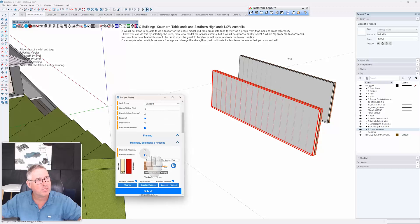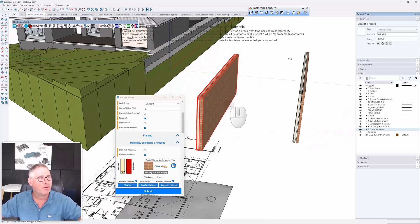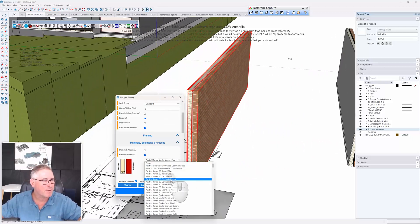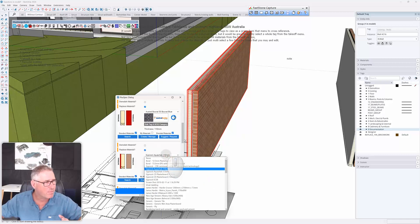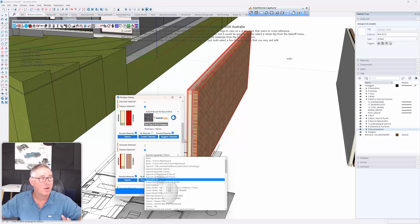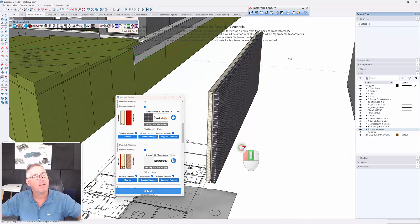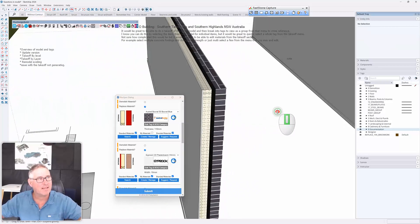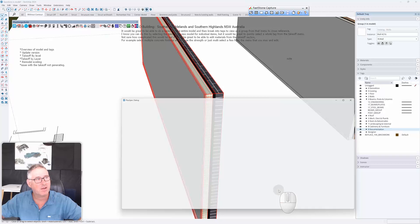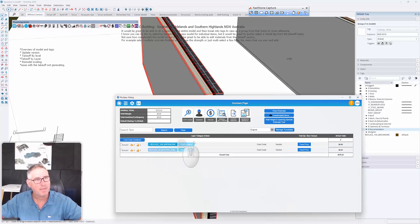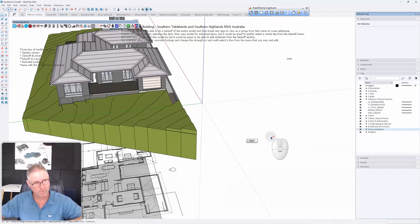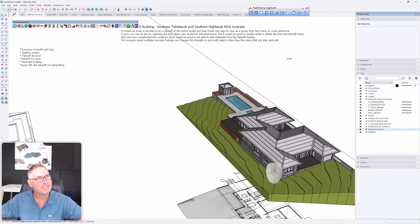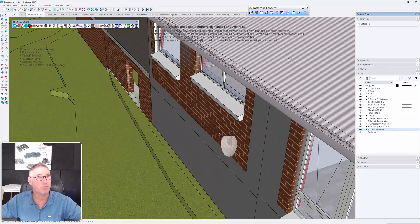However, when you're doing renovations, extensions, it's not unusual to have to either demolish an entire wall or actually remodel an existing wall. So if I click remodel an existing wall and go submit and I draw this wall, it's basically still a locked wall. And because it was selected as remodel or renovate, if I went to my materials, it's saying, do you want to replace or demolish the material? In this case, brick. Now, I'm going to replace the brick with a different type of brick, just to give you an example. Let's just say we use barrel blue. And then you scroll down and see if anything else is replaced. So if I want to also replace the internal lining, jibrock or drywall, whatever you may call it, and I want to put on another product and I want to quantify that, but not the rest of the wall, then that's what I would do. So I'm going to go in here and I'm going to choose plasterboard and go submit. And you'll notice it changes the brick, but the frame is still existing, yet the plasterboard would be right. And if I went right click, take off selection only, the only thing that it's done is replace the brickwork and replace the internal lining. And that's really helpful.